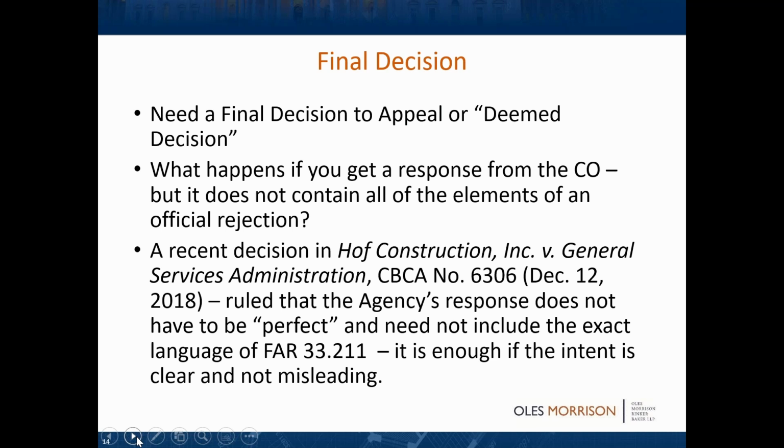But the thing that really, really upsets clients and contractors is you got a final decision. It's 100 pages long. In detail, it states why the claim shouldn't be paid. Then 2 years later, that government attorney, with a grin ear to ear, throws down his motion to dismiss, saying, well, Your Honor, it wasn't a sum certain. And you as a contractor, and me as your attorney, say, what do you mean it wasn't a sum certain? They issued a 100-page final decision. It doesn't matter. The fact that a final decision was issued doesn't cure any defect in your claim. Always remember that.